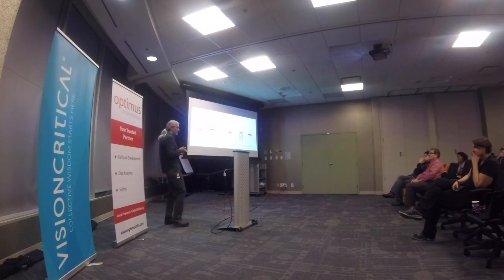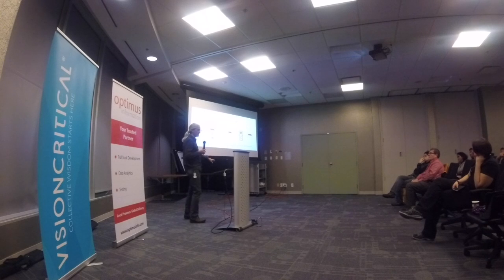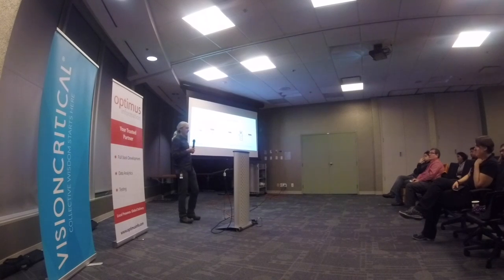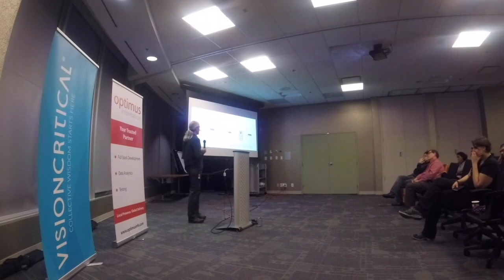There's no unit test, there's no decent integration test, nothing. I'm not going near it. So whenever we had to do features or changes in that area, it was like, don't want to do it. And if you do it, we're going to test the hell out of it because it's probably going to break. So again, you can associate risk with that: popular, critical, complex. It's got all of those things going for it. You can take those lists and use them as scorecards and say if it ticks more than one of these boxes, then it goes into a category of risk. It's a quick way of doing it.